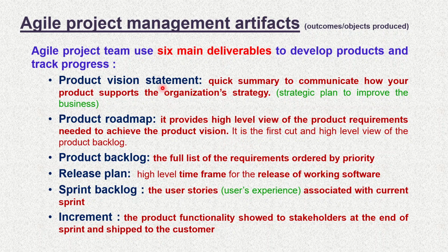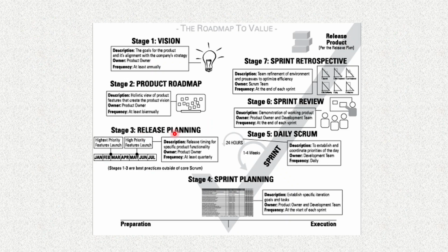Now, once I want to do this project, I need to create a release plan. Means how I am going to release this project, every 2 months or every 3 months, how I am going to release the software to the customer. I will complete one part of the project and release it, then complete the second part and release it, part by part. That is the release plan. So it comes later. If you look at this, in February I am going to release something, in May I am going to release something. We create a plan for how you are going to release the project.